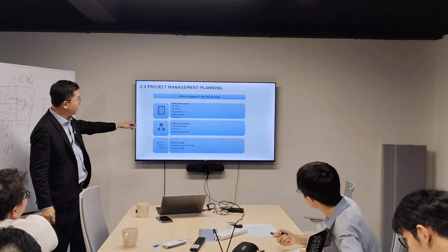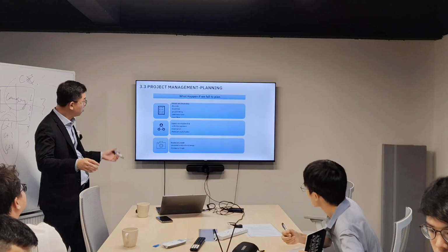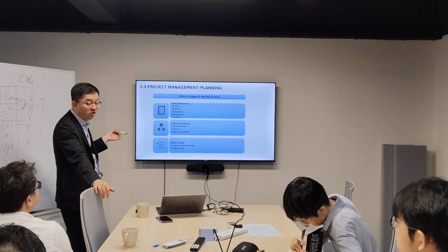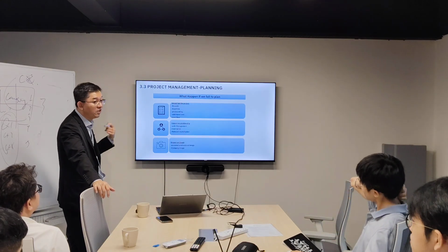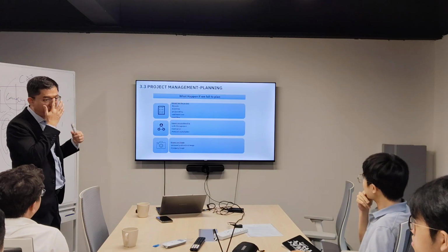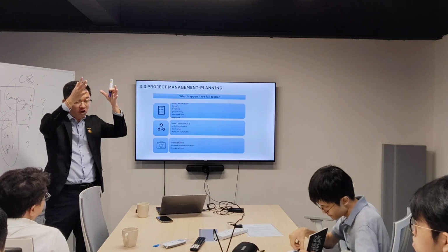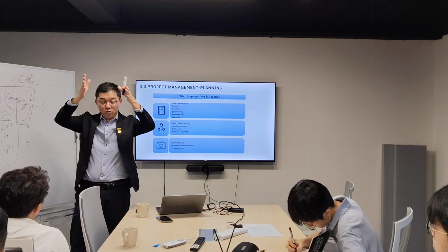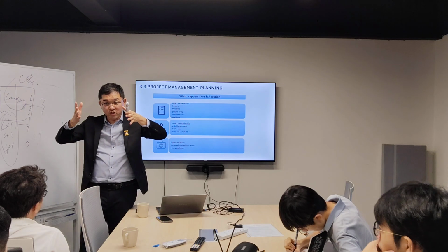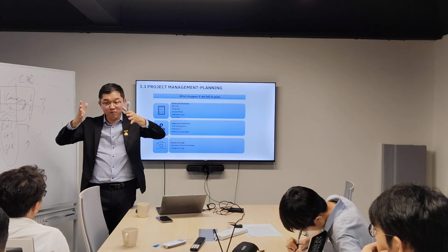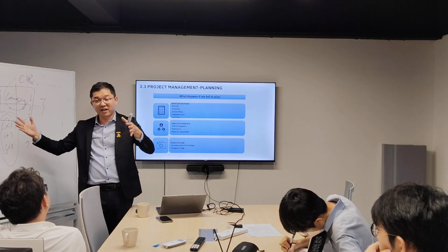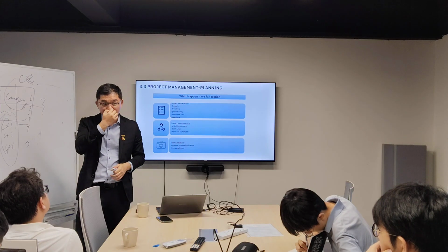Okay, that's the impact. You need to rework, you need to do OT, the project might be delayed, or there is an additional cost to cover the delay or to mitigate the mistake, then you will have a cash flow issue. Because normally when you plan for a project, you have the duration. Your budget is already spent on that. Maybe let's say you have a duration of 10 months. Your budget for your resources is already budgeted for 10 months for your whole project team. If let's say your project is delayed another 2 months, you need to pay for an additional 2 months. Correct?